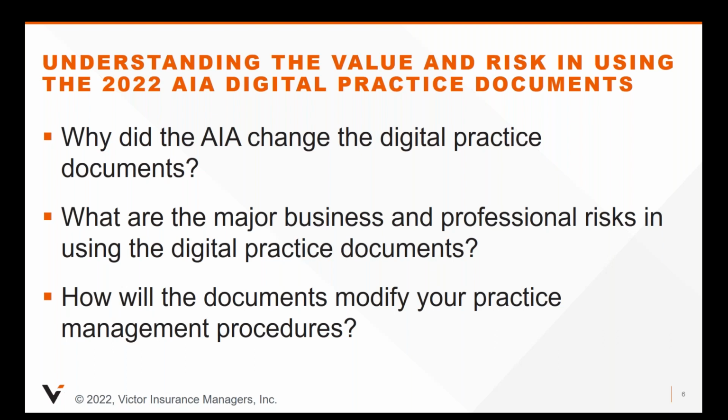The AIA Contract Documents program really faced the reality of modern construction. So while it both tried to enhance and streamline the sharing process, it also recognized that some BIM model versions will be used as contract documents. That is not new. Right now, civil engineers designing highways often provide digital information as contract documents. So using the AIA Digital Practice Documents means that the parties involved on the project, the architect, the owner, the contractor, and all the subcontractors and consultants, know how models will be shared, used, and relied upon through a contractual BIM exhibit.